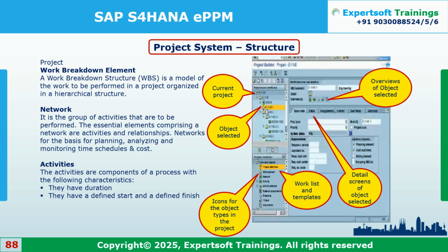Yes, you can perform the modifications. Just assume this project E1145, I am treating as my master data. Here I have done some structural planning, cost planning, revenue planning, budget planning, resource planning, and everything. Then whenever a new project comes, this number will get changed. Instead of E1145 it might be C1145, or 45 or 46.